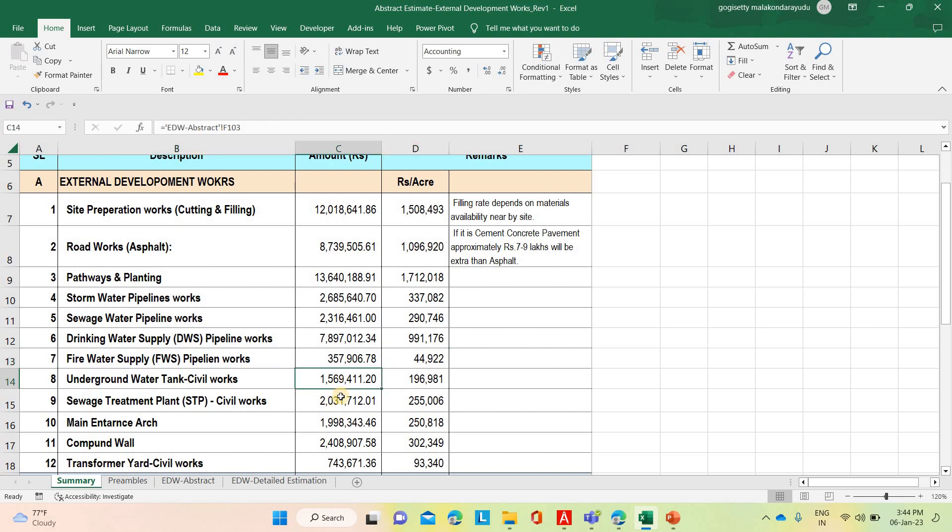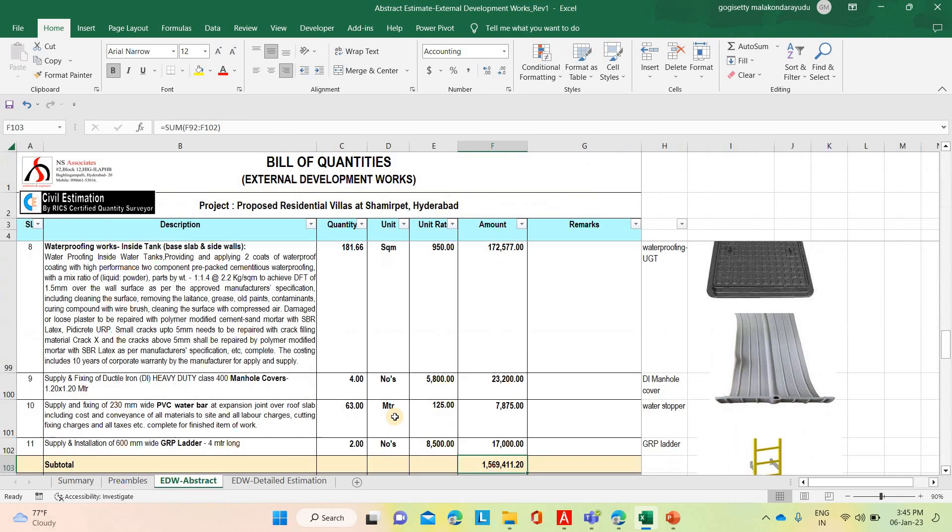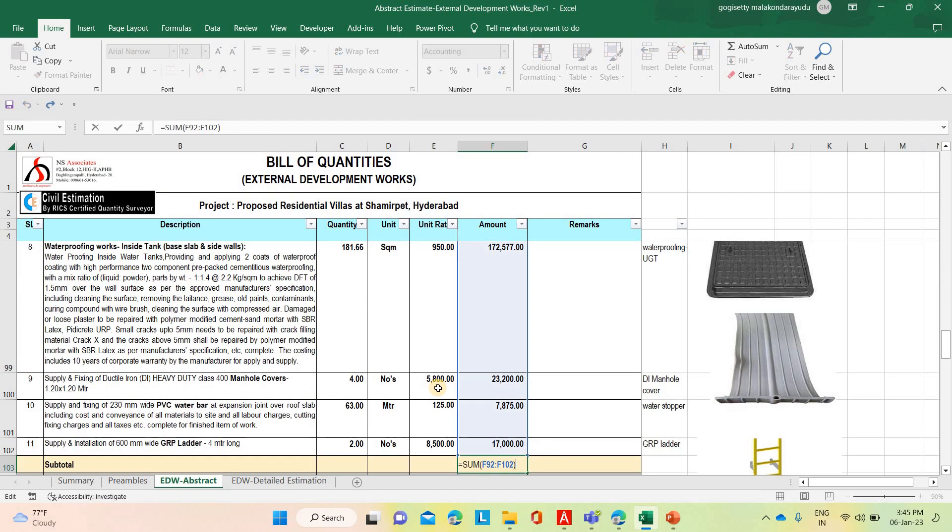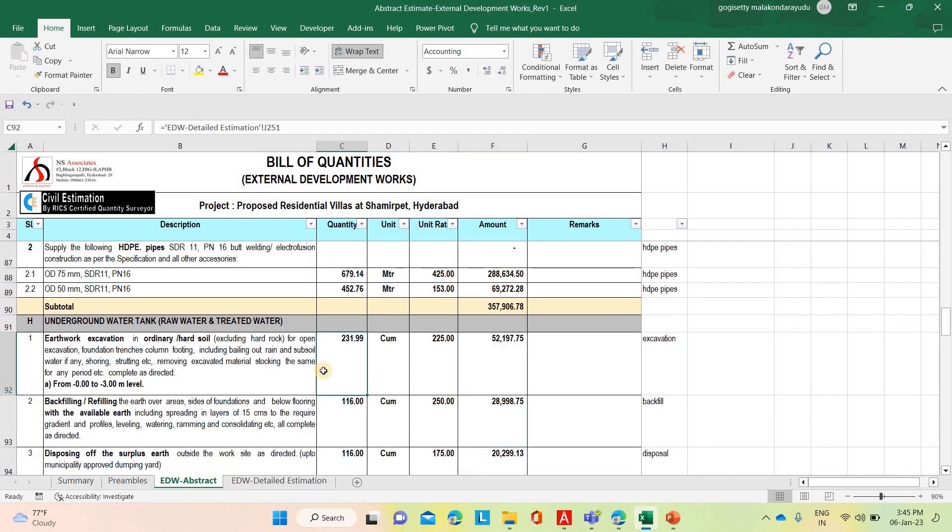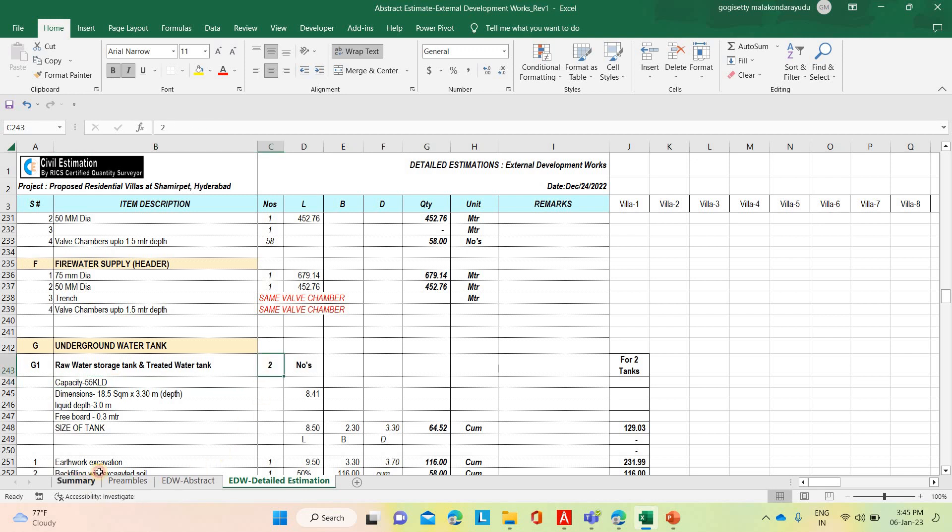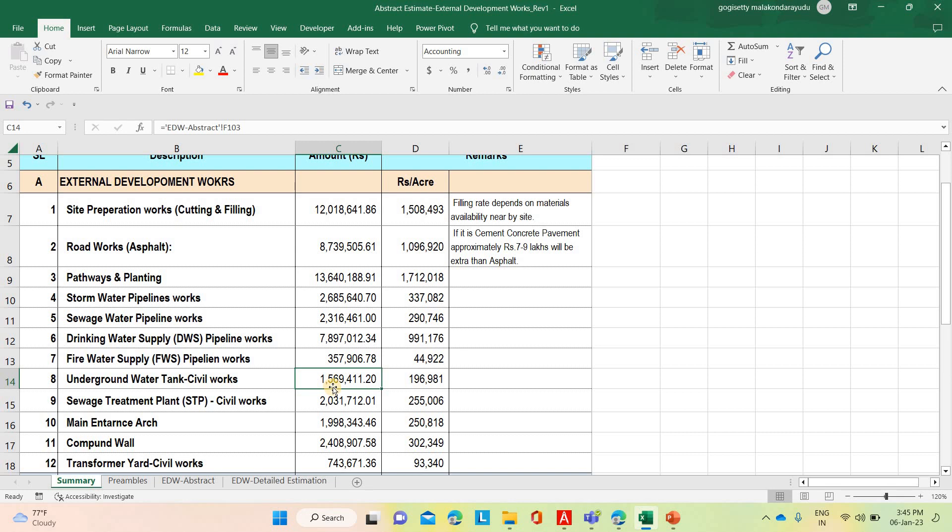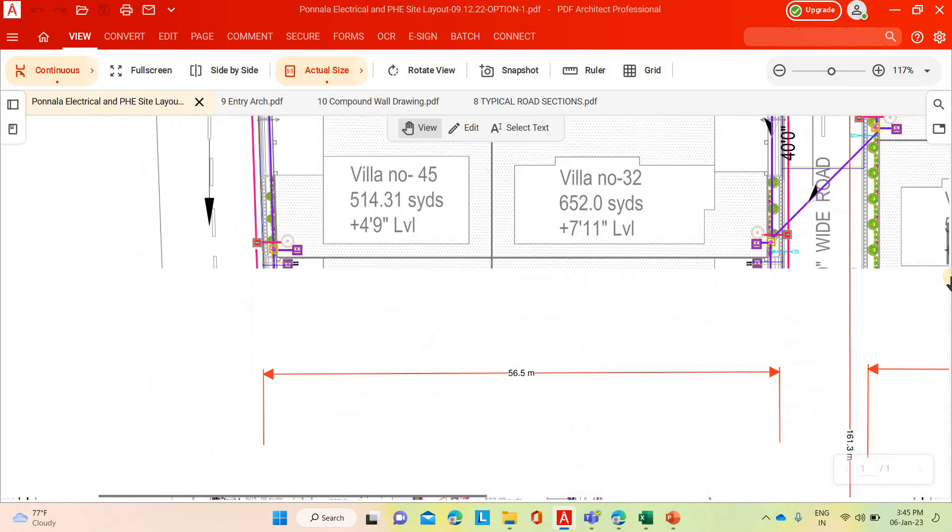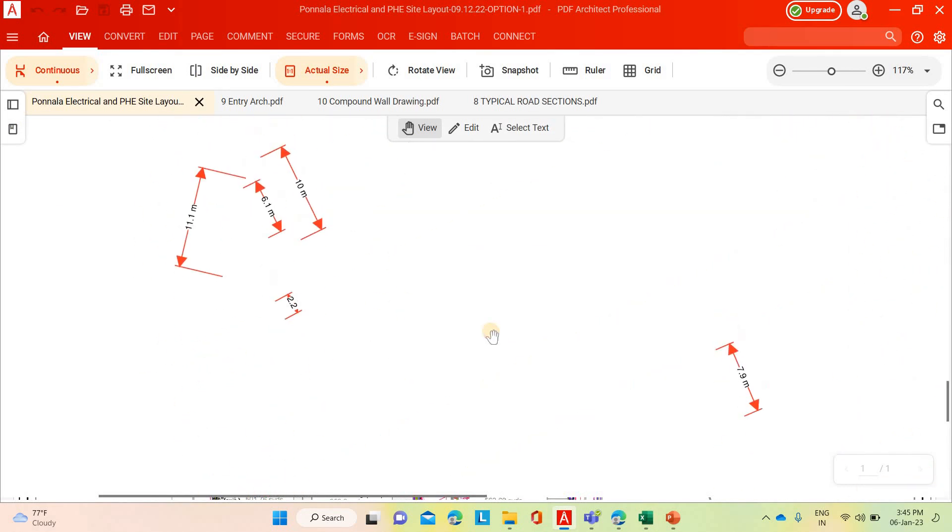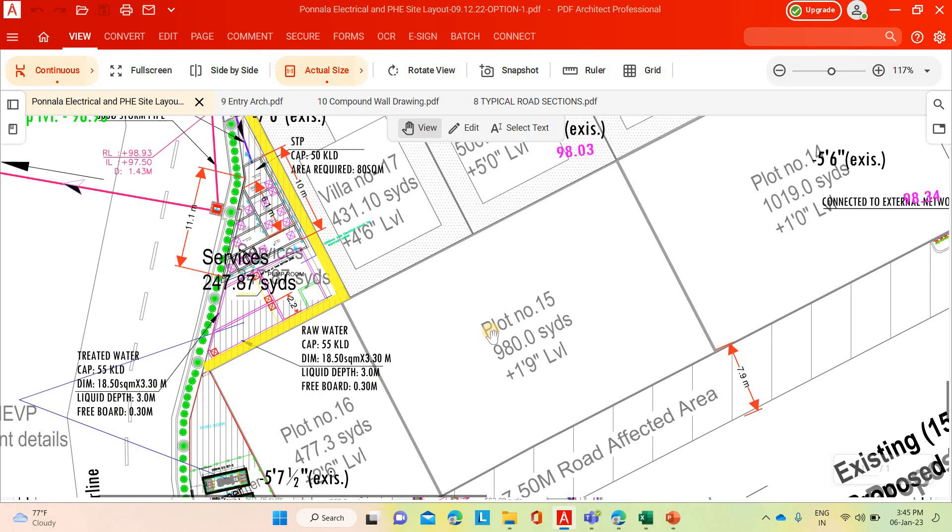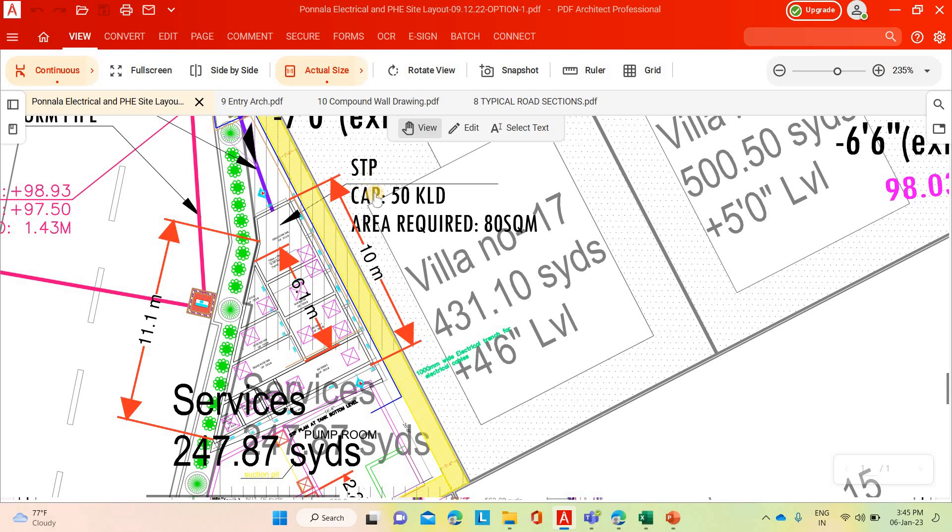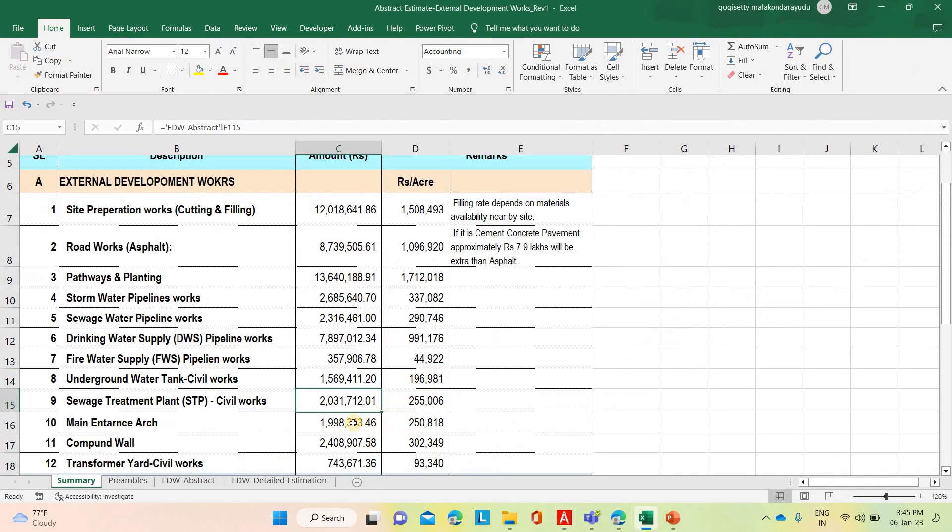Underground water tank. Underground water tank capacity also given by the architect, what is the size. That is the underground water tank, 55,000 liters per day capacity. Treated water tank and raw water storage tank. Two water tanks. Two water tanks cost will be 15 lakh 69,400. It will come per acre 1 lakh 96,000. Similarly, sewage treatment plant, sewage works. This is the sewage treatment plant. STP capacity, 50,000 liters per day. Based on that vendor given the design details, we have estimated the civil cost. That is 20 lakh 31,702, per acre 2 lakh 55,000.